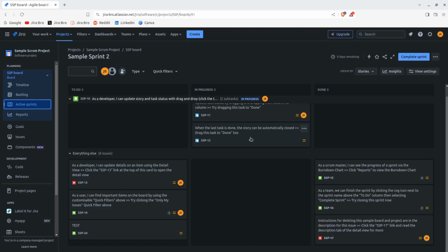And usually within a retrospective, the action items are put down, so those action items can be reviewed, and on the next retrospective the team can go through the action items from the previous retrospective and see if those action items were completed and why they were not completed.